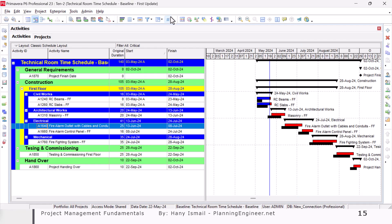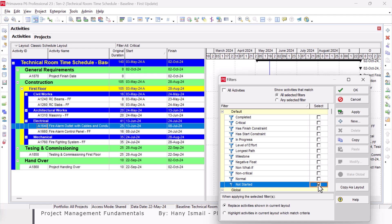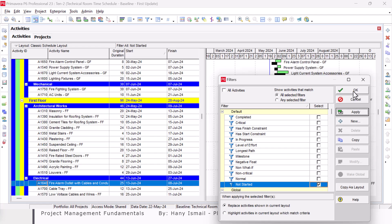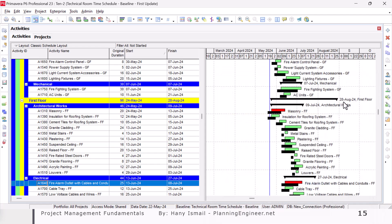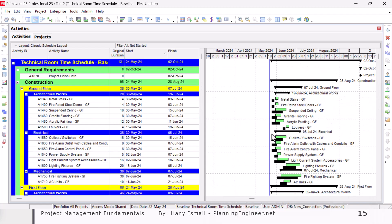First of all, I need to clear my previous filter. I'll show all the activities from here. Then I can simply select Not Started and select Apply - these are the activities that are not started.